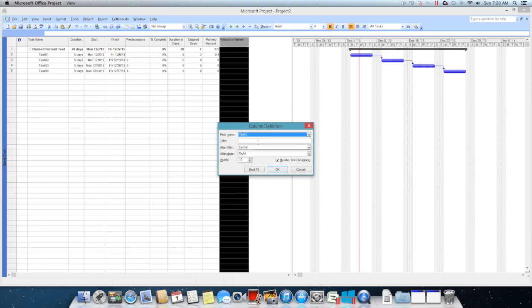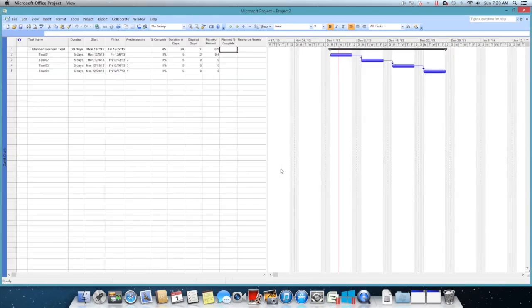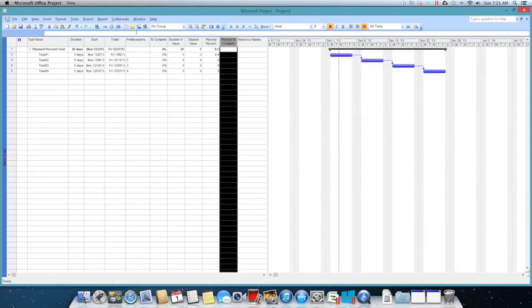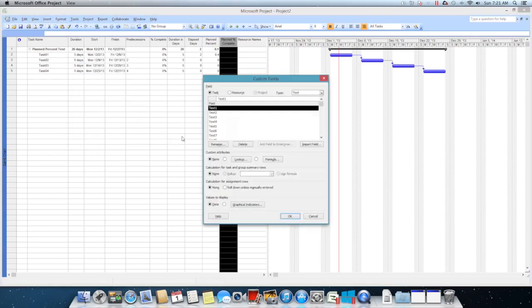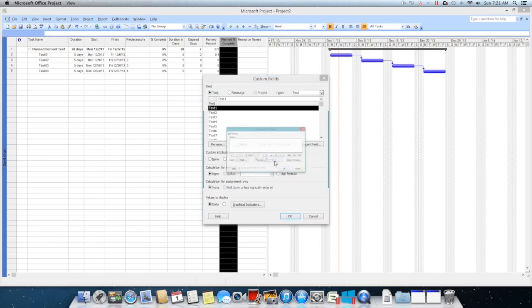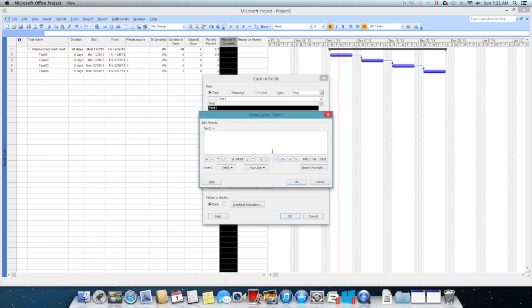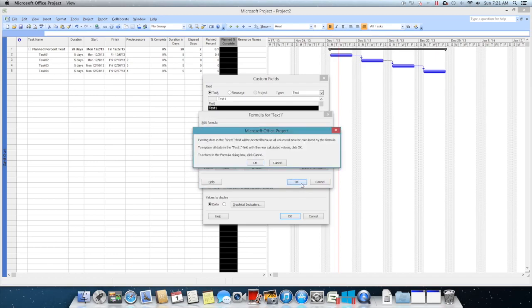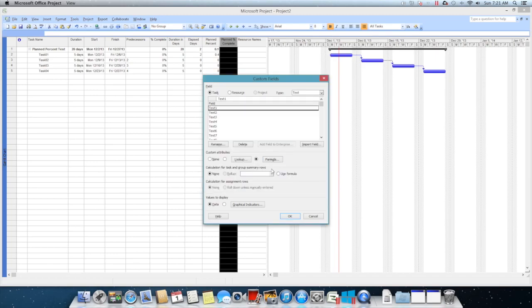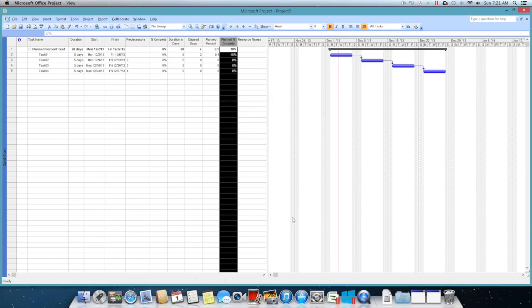I'm using text one, say OK. I come here and then click on customize fields and use the formula. I'm just trying to format this number three, so I'm formatting the number three to have it as percentage. Just click OK and use the formula. Now you notice that as of any status day, this field calculates the planned percentage complete.